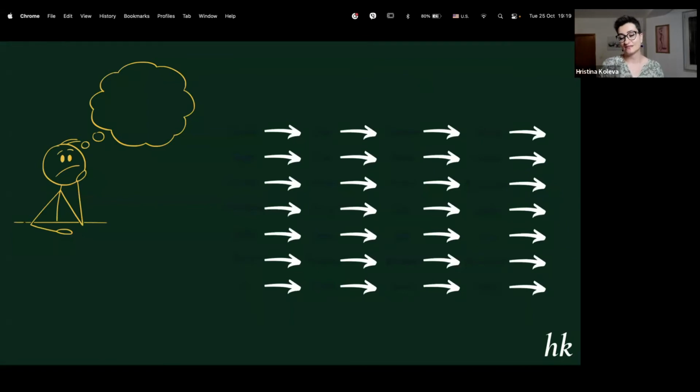But before we get there, what actually takes most of the time is the so-called waiting time. The time that it takes for somebody to work on a task. It's always in the waiting. Somebody is waiting for something to happen in order to start working on the task. Coding is pretty neat and clear. Testing is pretty neat and clear. We can definitely estimate and give our predictions, especially if we have a good amount of years of experience. We know it's relative. It's not accurate. I mean, it's correct, but it's not accurate.